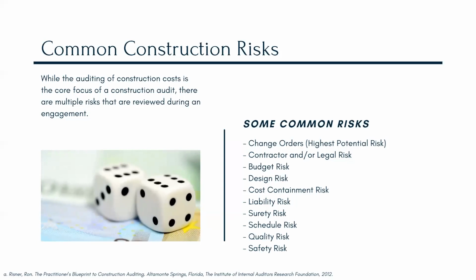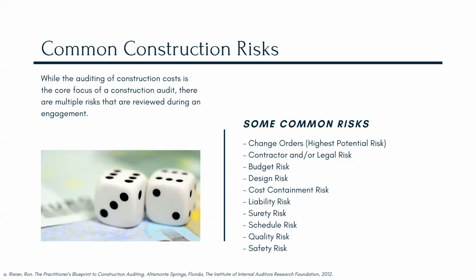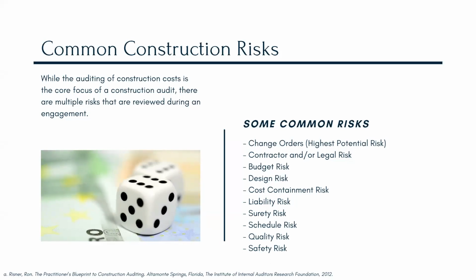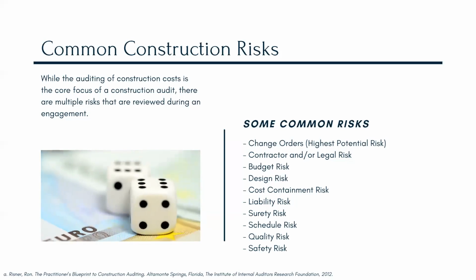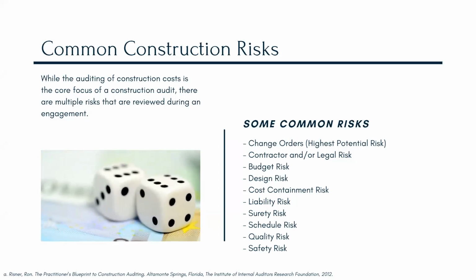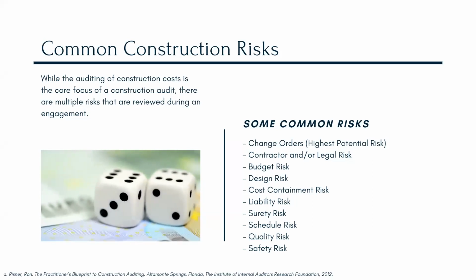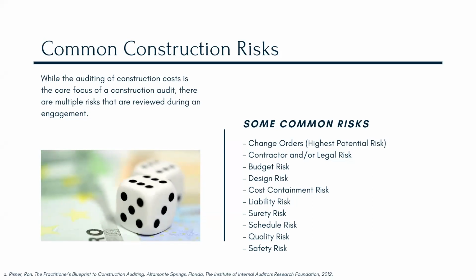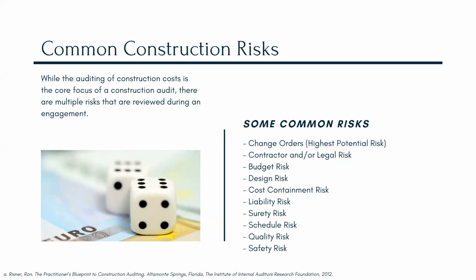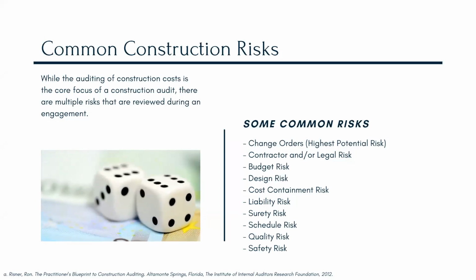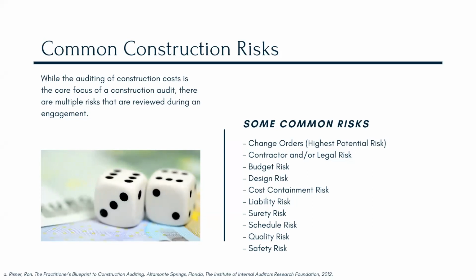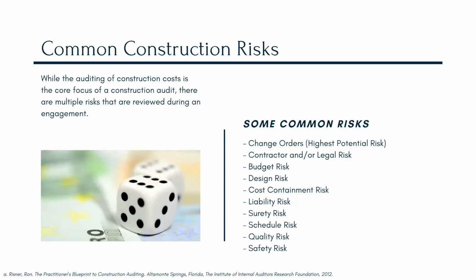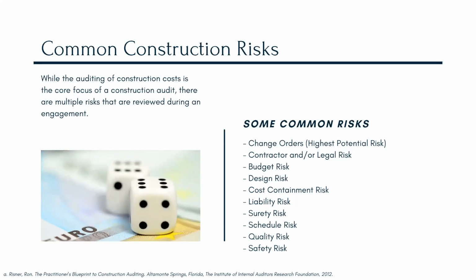Typically in the audits that we perform at a high level, if it's a post-pay environment, we'll take all change orders and quickly look at the quantity of change orders and the total spend of change orders as it relates to the expected or original contract sum or project sum. As a general rule of thumb, change orders will typically be about 5%, often up to 10%. If the change order amount is over 10%, that's a little bit of a red flag. While those could be valid, it definitely warrants looking into and understanding why the change orders were such a high amount.